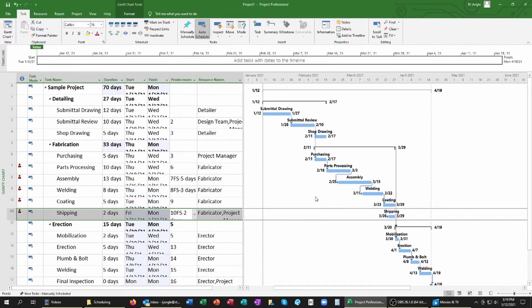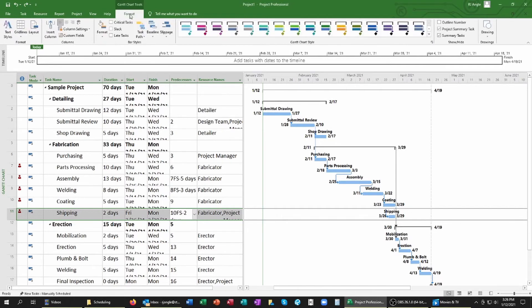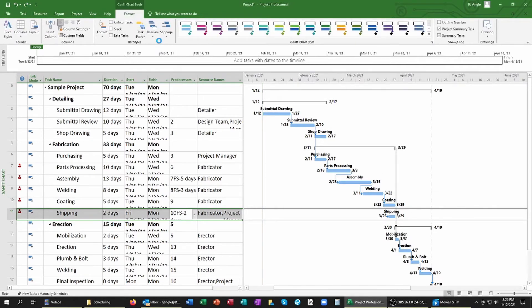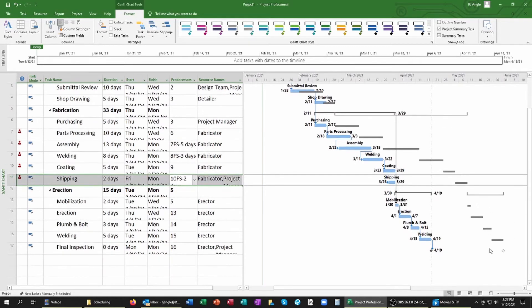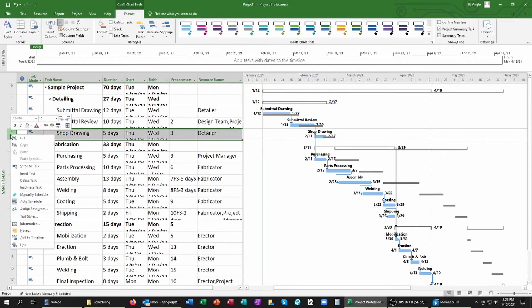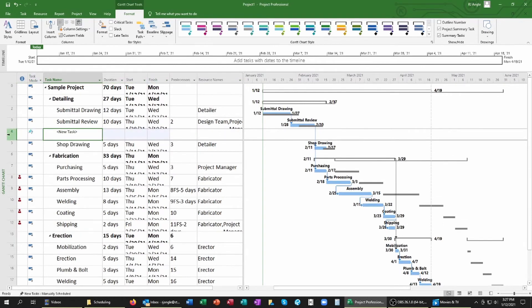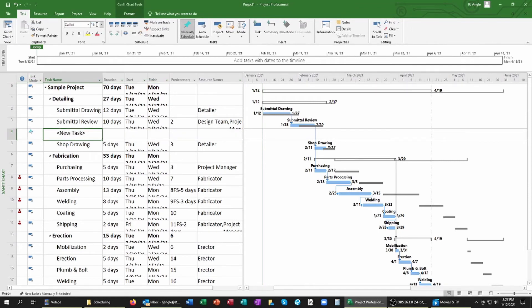Your final option is outsourcing. If your company doesn't have the time, staff, or resources to meet the schedule that you need, you're going to have to hire out some help. This is going to erode into your profit margin, but it's going to help you avoid schedule delays and liquidated damages that might have robbed you of that or worse anyways. After you've done this and you've reached an amicable schedule agreement with your employer, the remaining duty that you have with your schedule is to manage it.